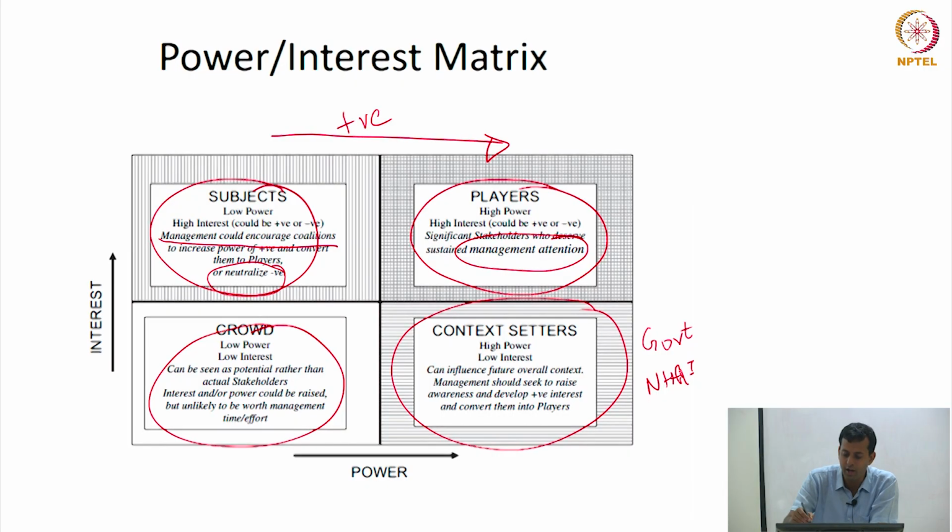So essentially, you really want to spend a lot of attention on the top right. You want to spend some amount of attention on the top left and on the bottom right, and probably the least amount of attention managing people on the bottom left. But you'll understand that only if you list out your stakeholders and you actually map them like this, right?